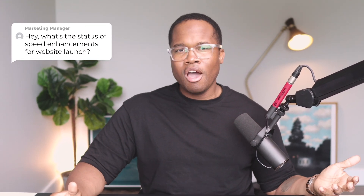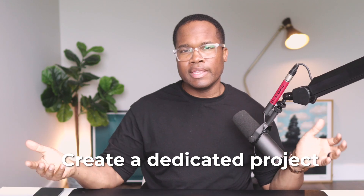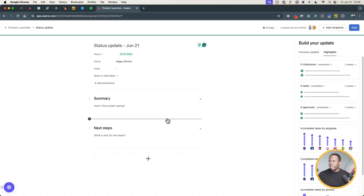This is problematic for a few reasons. There's a lack of visibility around status — you'd have to go into the task detail, then into sub-subtasks, making it really confusing and difficult to report on anything. When your marketing manager or CMO asks about the status of those speed enhancements on the website launch, where would you go? I always recommend taking project management out of the task level and bringing it up to the project level — create a whole project with its own custom fields so everyone is clear on exactly where the project stands.